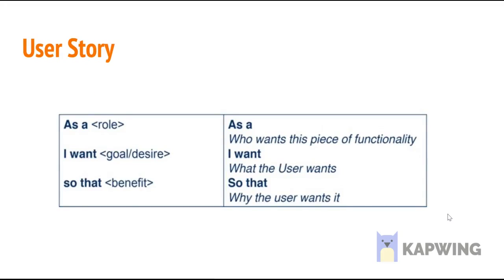The next and an important term that we have in Scrum framework is user story. Well, user stories are one of the primary development artifacts for the Scrum teams. A user story is a very high level definition of a requirement, containing just enough information so that the developers can produce a reasonable estimate of the effort to implement it.